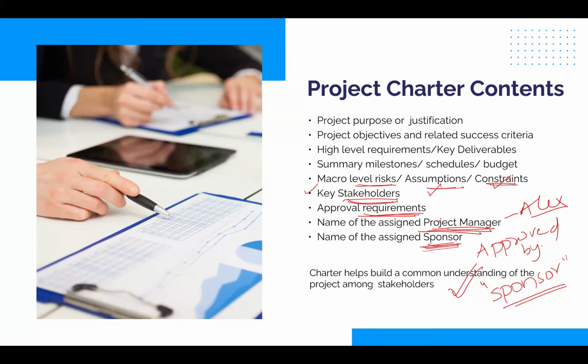And if we talk about major responsibilities, okay, before that, in one word, I would say sponsor provides overall direction to the project. So if you ask me what does a sponsor do, it provides overall direction to the project. In one word, okay? It doesn't do day-to-day management. Day-to-day management is the responsibility of project manager. Sponsor would provide overall direction. Let me count detailed responsibilities of sponsor. Watch, these are some. All major approvals with the sponsor, approving the schedule, budget, other approvals, sponsor would do.